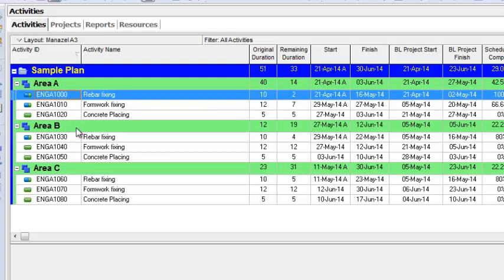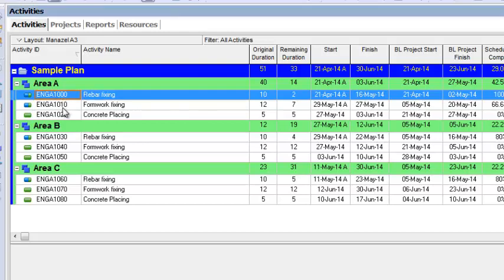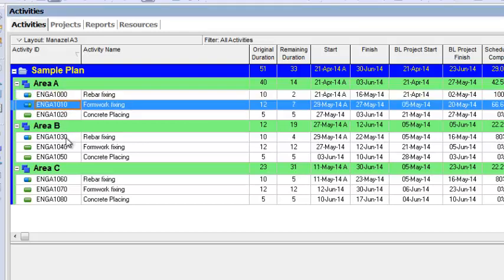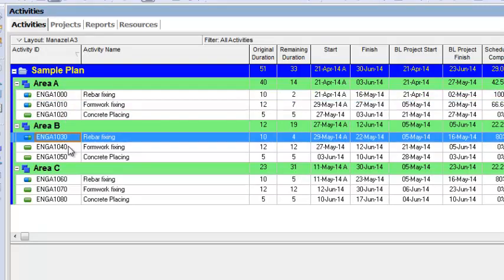step. If your activities are in the thousands, it is laborious work to change the activity ID one by one in all the activities of your project. You can do this by the global change. This is the way how to modify the activity ID of all your activities in one step.